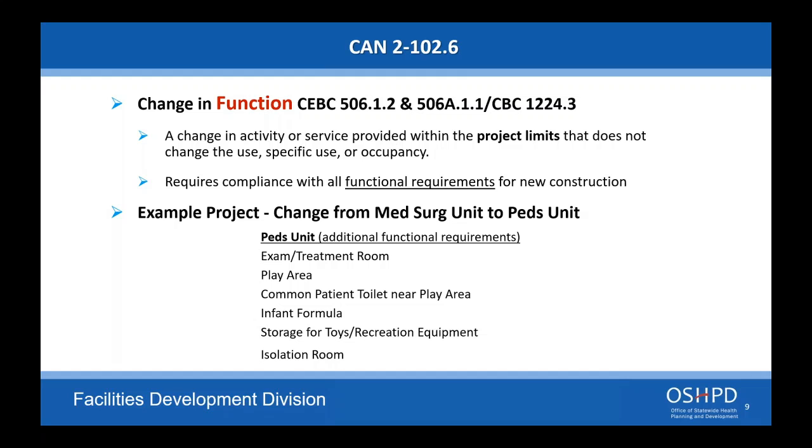A renovation will trigger an OSHPD project. It may not trigger construction. If you have an existing alarm system that's not compliant with current code, there may not be any requirement to upgrade that as well. Say if you're going from pediatric to med surg, as I mentioned in the example before. But if it's a fire life safety issue, that may override the requirement. So I would definitely talk to your OSHPD team before submitting to see what the extent is.